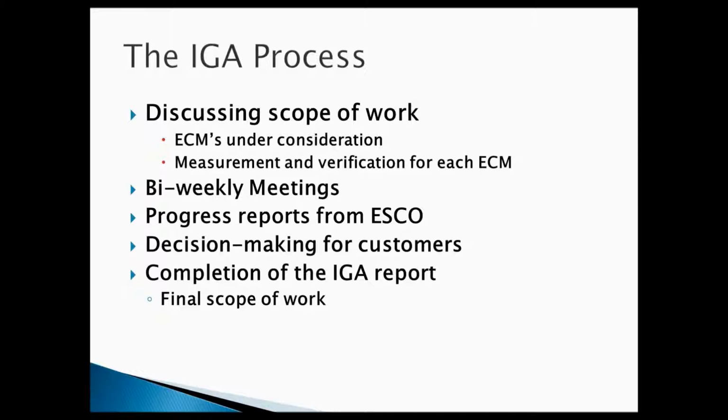As we also mentioned last week, a comprehensive audit like this can be expensive to perform. Normally, this cost is going to be absorbed into the project, and it may or may not appear as a separate line item. If, however, you pursue the IGA and decide not to continue with the project, you'll normally be expected to reimburse the ESCO for the costs that are incurred.